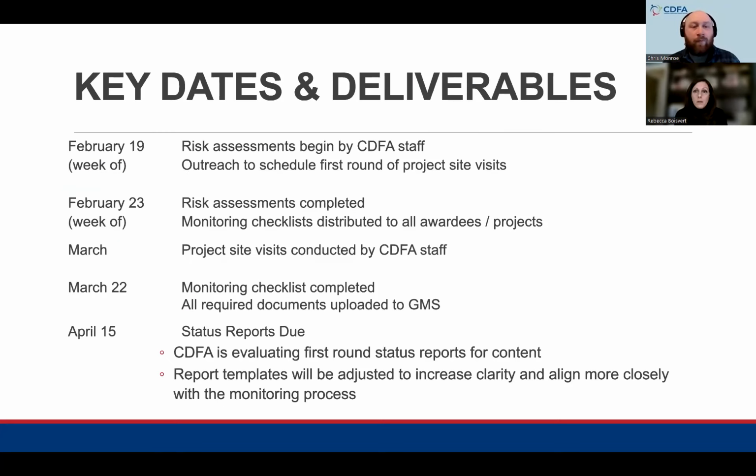Yeah, so that week, the risk assessments will be distributed and the monitoring checklist will be distributed. For example, for high risk projects that either don't have a substantial amount of this documentation already in place, or might need templates or support in locating those documents. The frequency that has been designated to us by the governor's office is every 30 days, but we'll be working with you continually to make sure that we can get you into a place where the monitorings will be significantly less frequent and less continual.